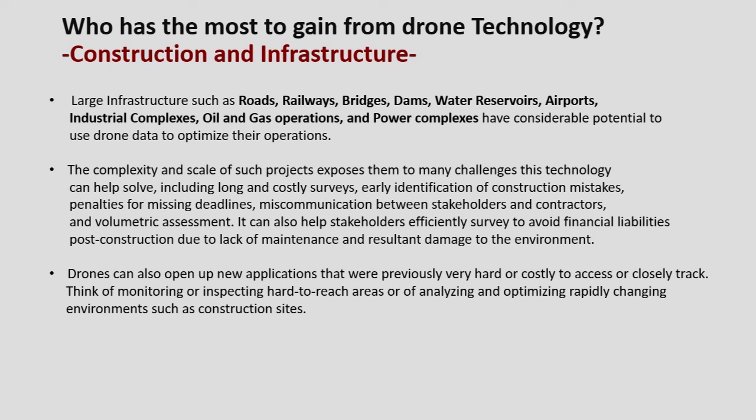Large infrastructure such as roads, railways, bridges, dams, water reservoirs, airports, industrial complexes, oil and gas operations, and power complexes have considerable potential to use drone data to optimize their operations. The complexity and scale of such projects exposes them to many challenges this technology can help solve, including long and costly surveys, early identification of construction mistakes, penalties for missing deadlines, miscommunication between stakeholders and contractors, and volumetric assessment. It can also help stakeholders efficiently survey to avoid financial liabilities post-construction due to lack of maintenance and resultant damage